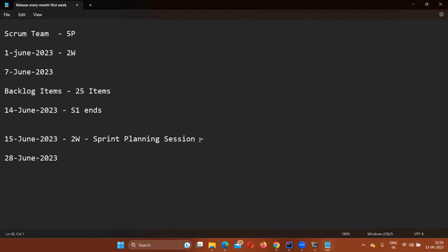Update. You are given some tasks in the sprint planning session on 15th June. So from 16th June till 28th June, every day you have something called a Scrum call or daily stand-up call, whatever you want to call it.